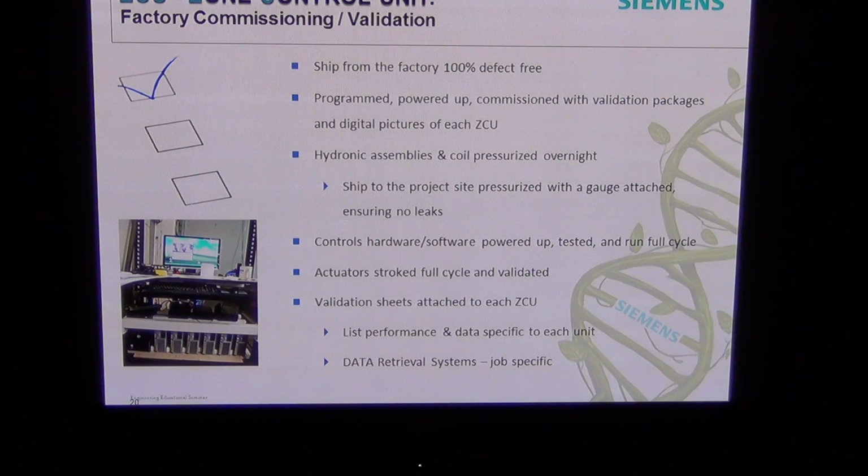He goes, "Oh, you guys take a digital picture of this. Oh, my stupid sheet metal guys, they don't know." They start blaming the sheet metal guys. But if we didn't have those digital pictures, what ends up happening? We get into a pee-pee match with these guys, which nobody likes to do. So the digital pictures are actually a great way to keep everybody honest on the job, and also make your job a lot easier, and it also goes into a data retrieval system.